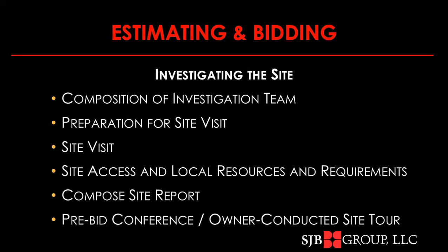Okay, during the site visit, we're going to want to take pictures. We want the photographs to have time and date and location stamps on them. That's easy to do with today's technology. You might want to take a video record with audio documentation. Talk while you shoot.